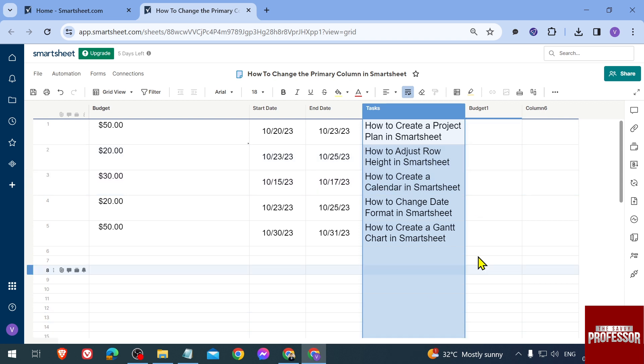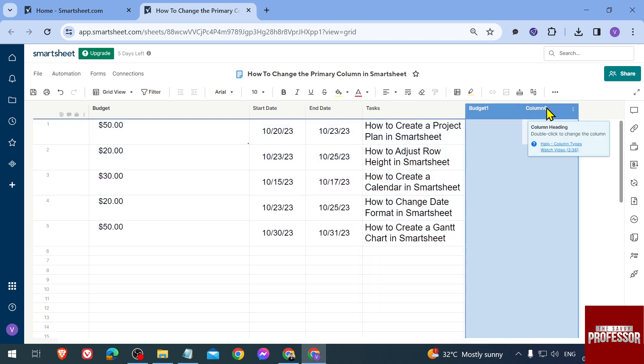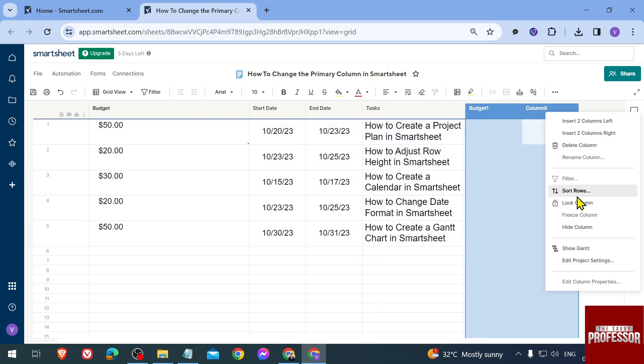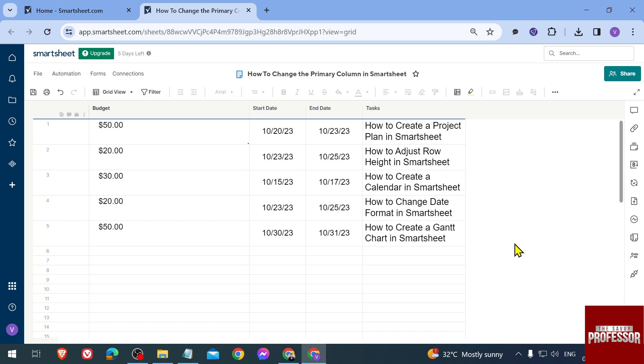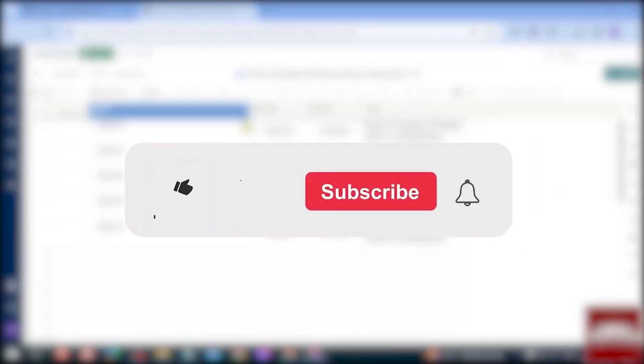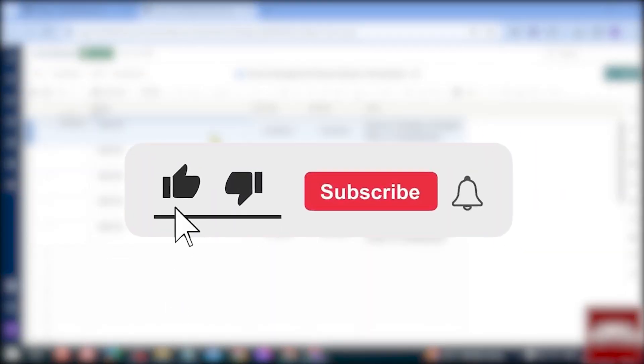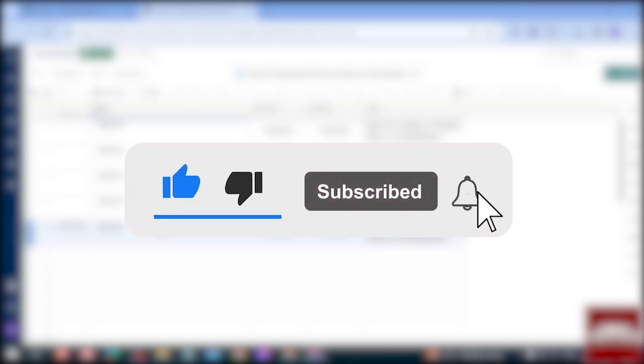If there are other columns here that you don't need, you can simply highlight them and delete them just like that. Yes, that is the only way to change the primary column in Smartsheet.